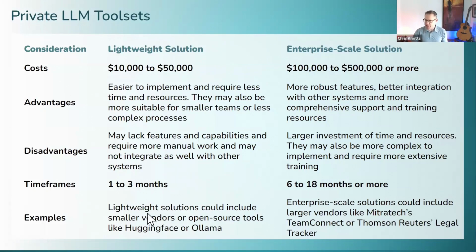And then the last thing I'll say about some of these lightweight situations is that some of these tool sets are open source, and some of them are free. So again, a very low level of cost investment there. Now, on the enterprise scale, that's a little bit of a different deal. My assumption is that if you're thinking about a private LLM tool, then you are looking at an enterprise scale tool, and that's going to require a different framework, different set of vendors, and a different project team. So I think the big takeaway here is there's obviously a huge range, but you are looking at a six-figure investment, and at least half a year.